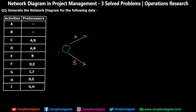These are the nodes or events, and the yellow arrows are the activities. Now to start C you need A and B together. When A and B start simultaneously you reach two different nodes, but C requires A and B together. You cannot connect A and B to one single node directly — that is not allowed in a network diagram. You cannot have the same start and end event for two activities. This is where the concept of a dummy activity comes into picture.